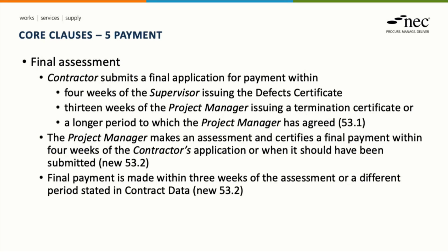The provisions around final assessment have been changed from standard NEC4 ECC. Standard NEC4 required the project manager to make the final assessment, irrespective of an application for payment from the contractor. The Hong Kong edition requires the contractor to submit an application for payment in relation to the final assessment. The timescales within which the application is submitted are similar to NEC4 ECC.